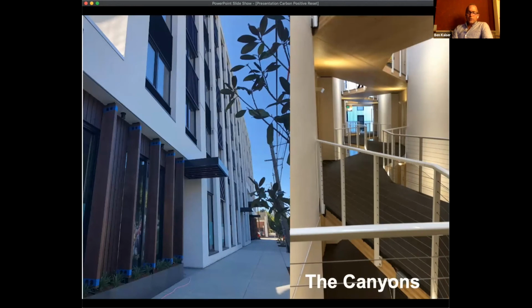This is the project we're just finishing up. I think we just got our occupancy permit a couple weeks ago. This is a 6-story all timber multi-family building, and we had some fun in the interior cores with CLT panels zigzagging down an open atrium. It wasn't intended as this, but as a result, it's kind of post-COVID architecture. All the circulation systems are actually outside. So we're thankful for that. We kind of stumbled into that one, but we're also pleased with how, again, CLT clicks together so well. And again, we were doing about a floor every 4 to 5 days. Okay, next one, please.